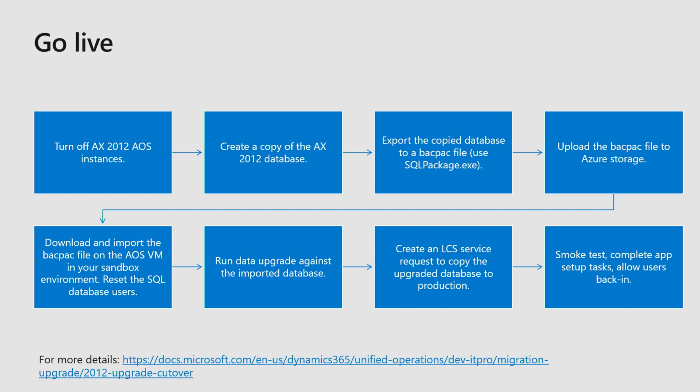That's when we recommend you do some set of smoke testing to make sure that the environment is stable and it is what you are expecting. And then once you go through the initial smoke testing, then you're good to let all your users in and call it a go live.